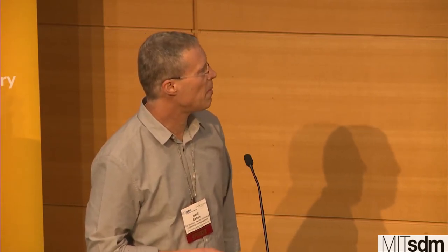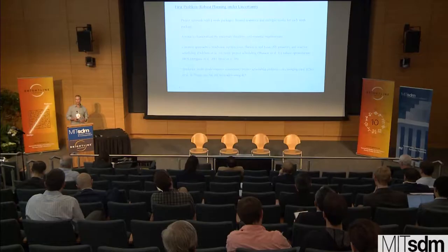So when dealing with project scheduling or project planning, the common approaches are stochastic optimization, in which we optimize an expected objective. For example, we want to minimize the expected duration of the project. Proactive and reactive scheduling, in which we insert time buffers between the project activities or work packages in order to absorb disruptions which will emerge during the project execution. Fuzzy project scheduling and robust optimization, in which we want to optimize the worst possible scenario within certain limitations that I will speak about.